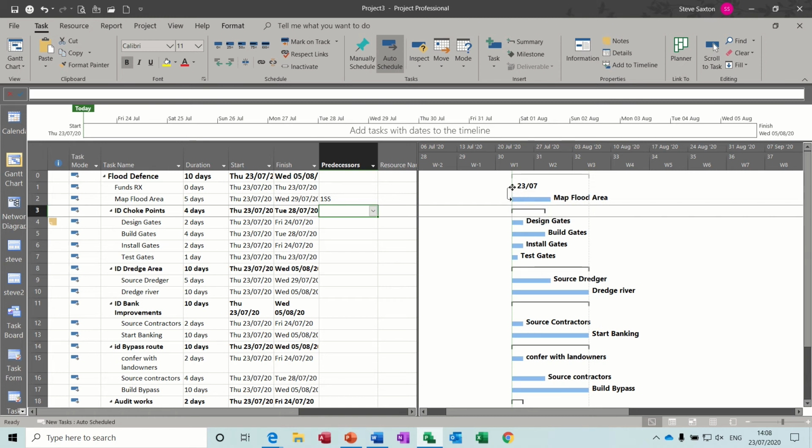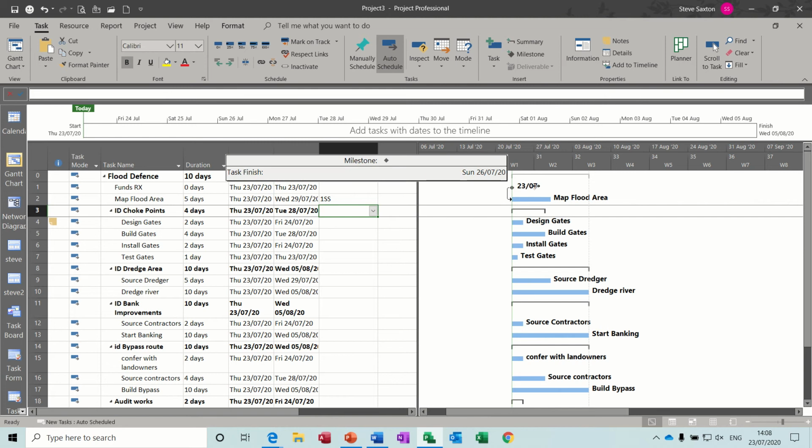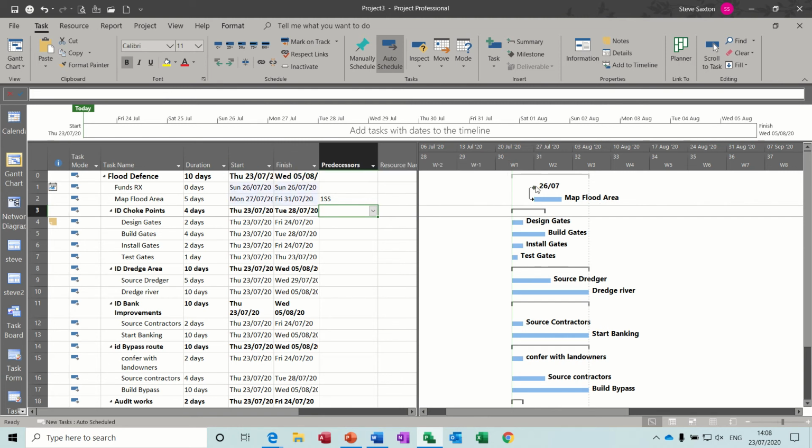So if you don't get the funds, or there's a delay, and that has to go forward, it just pushes this forward. So it's a good thing to have some sort of trigger. Project initiation document is quite common if you use Prince2 methodologies. That's what you would use. But whatever it is, an invoice received, payment received, funds received, that would be a milestone trigger, gate 0, whatever you call it as a company. That's the trigger, and then your first task links on like so.